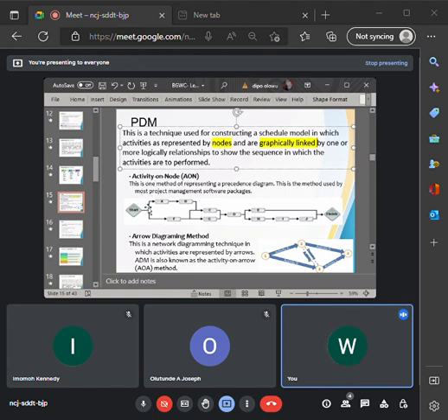Now, this arrow is showing us the relationship. What this arrow is showing us is the precedence, how it flows, which means when we start the project, the arrow is showing us that we have to start activity A and also start activity F together. You can see that when we finish activity A, we must start activity B. You can see the flow. So all this is what is referred to as the network schedule diagram. All right. So sequencing of our project helps us to create a network schedule diagram. By the time you sequence your project, the logical sequence from the start to the finish, what have you successfully done? You have successfully created a network diagram showing the connectivity of each task that needs to be performed, and in the logical sequence they are to be performed.